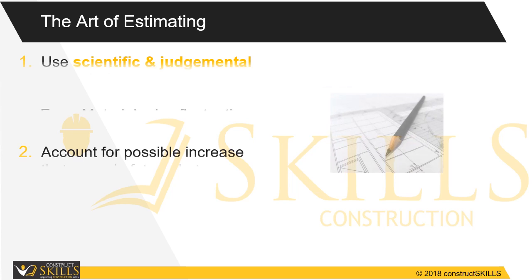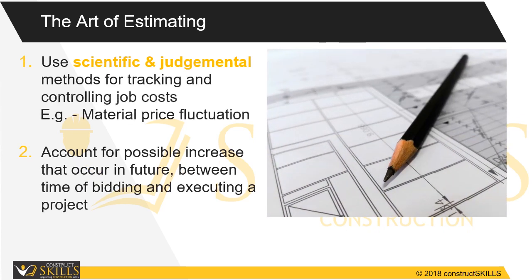The Art of Estimating. While estimators use scientific methods for tracking and controlling job costs, they must also use their judgment in ways that are more artful than scientific. For example, material prices fluctuate, and the estimator must try to account for any possible increases that may occur in the future, between the time of bidding and executing a project.